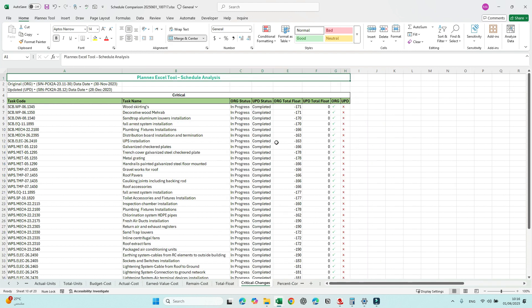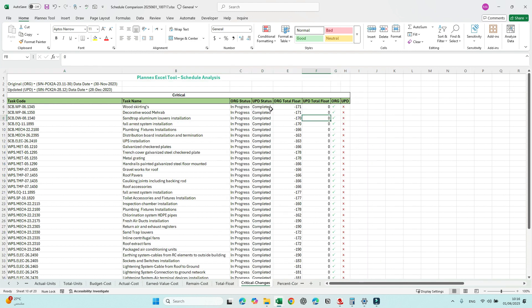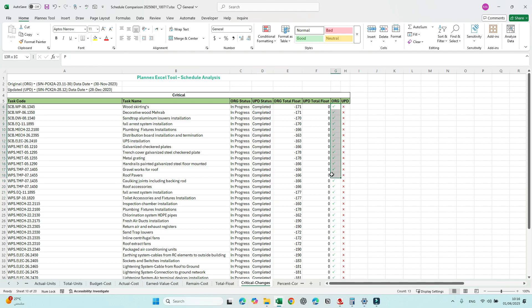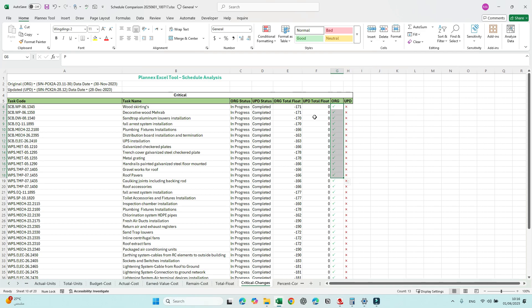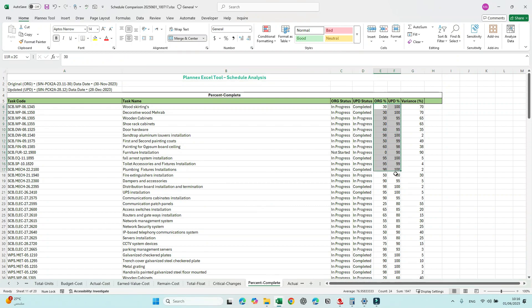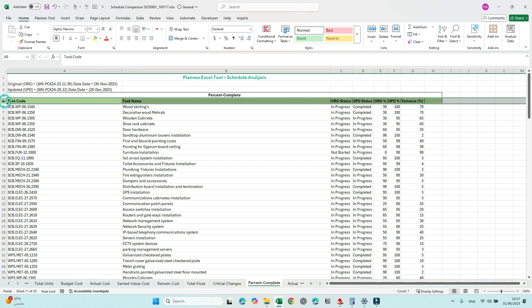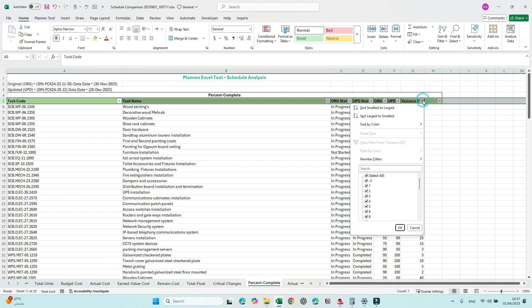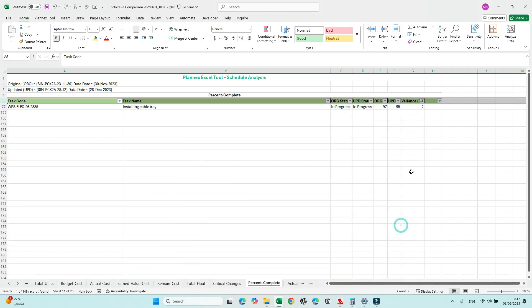Now let's check the Critical Path section. Completed activities will no longer be critical — for example, one activity was critical with a negative float of 171 in the original file, but once completed it became non-critical. For Percent Complete, we can filter — if there are negative values, we need to justify those.